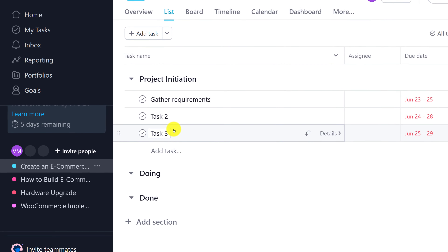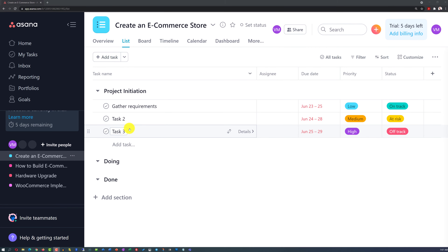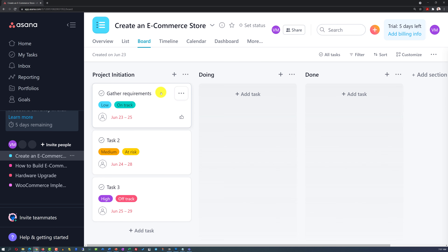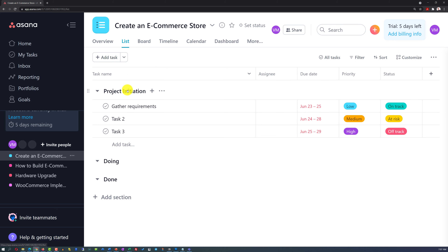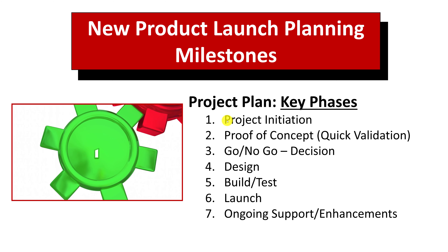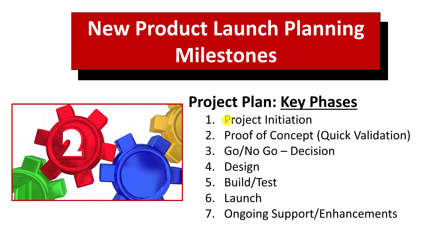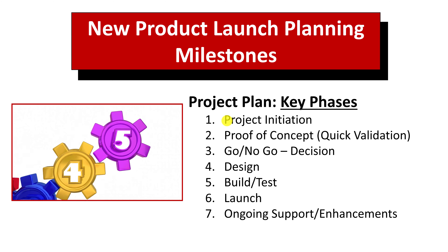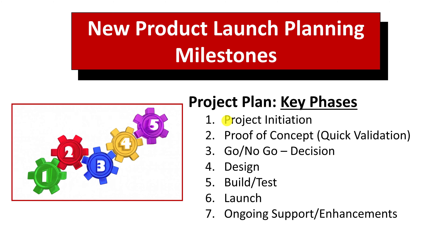We are looking at a different project and using a different view. Let me switch to the board view to remind you of the same view we just had. But instead of to-do, doing, and done, we have project initiation, doing, and done. If we switch to the list view, an equivalent of a section in the list view is an equivalent of a column in the board view — that's how simple it is. All we need to do to set up the structure with the seven key milestones is take the content of the seven milestones and create a section for each individual milestone in Asana.